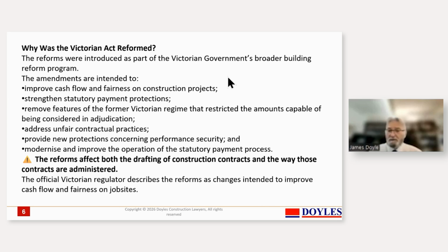So that's an important development, and it's an important development if you're, for instance, facing unfair time bars. So the time bar is that if you don't claim within 24 hours, then you lose your claim. That would be unfair, and this Act tries to restrain them and make sure that they don't actually apply. So you should come out with an impression that the government has tried to clean up some aspects of the construction industry and make sure that the claims procedure is fair and reasonable. It doesn't remove all the risk of contracting, but it substantially reduces them.